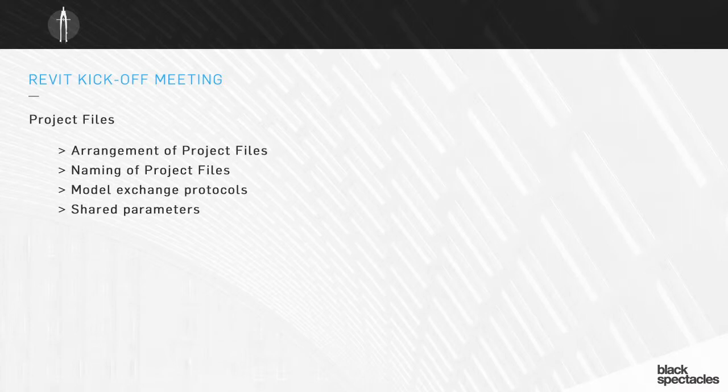You have to talk about naming of the project files, keeping naming consistent across all files. You also want to establish model exchange protocols — how are you going to exchange and coordinate models with other project team members? Are you going to exchange models the old-fashioned way, FTP-ing them once a week? Or are you going to use an automated system through Autodesk Buzzsaw or a program like NuForma that automatically exchanges models in the background overnight, so you always have fresh linked models and everyone is always up to date?